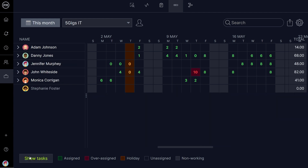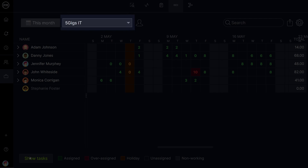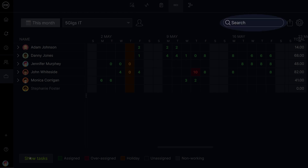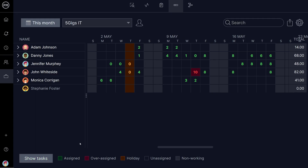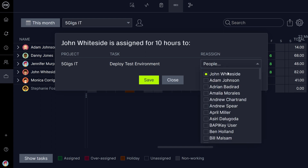To dig in deeper, you have a number of options: adjust your date range, select specific projects, use the search bar, or use the filters. To balance the workload, simply click on the box and use the drop-downs to choose other team members for tasks to be assigned to.